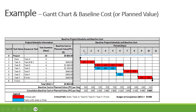Looking at cost per day: day 1 is $320, day 2 is $320, day 3 is 320 + 400 = $720, day 4 is $720, day 5 is $720, day 6 is $720, day 7 is $320, day 8 is $320, day 9 is $320, and day 10 is $320. So the project duration is 10 days. The cumulative baseline cost adds up to $4,800, and that is our budget at completion.